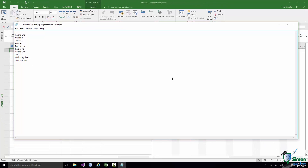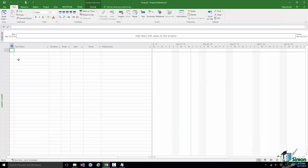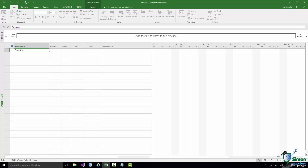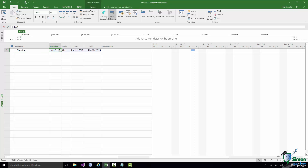Let's take the first one — Planning — and set that up first. I've created a new blank project and in the task name I enter Planning. I'm using Gantt Chart View, and there are a couple of ways to switch to it: use one of the buttons at the right-hand end of the status bar, or go to the View tab and select Gantt Chart View. Also bear in mind that you should have new tasks set to Auto Scheduled, or what I'm going to do next won't work. Having entered Planning as the task name, I press the Tab key and a number of fields are filled in for my first task.